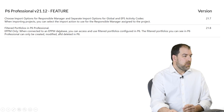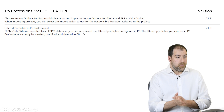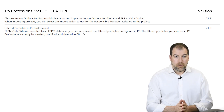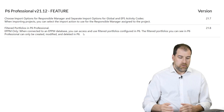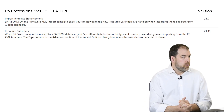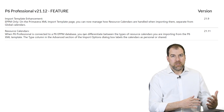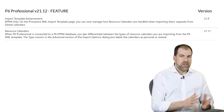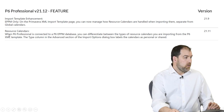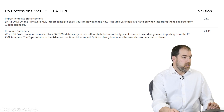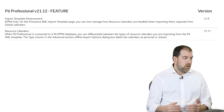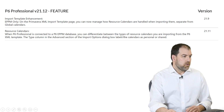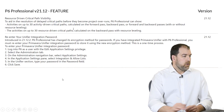EPPM only: when connected to an EPPM database, you can now access and use filtered portfolios configured in P6 — better integration between EPPM and P6 Professional. There are also import template enhancements for XML on the EPPM side relating to resource calendars, allowing you to differentiate between types of resource calendars when importing from a P6 XML file.